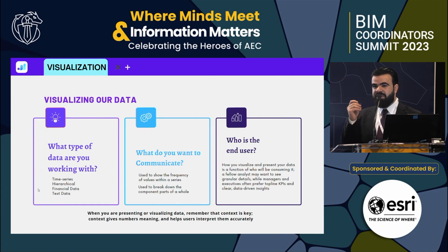The last situation I had was another client, where one of the project managers was asking for a very small narrative report, coming to his office or his email every day to tell what happened during the last week. So you ask for a short report that has earned value, planned value, what happened there, what's the variance, what are the major delays, and we just send that.